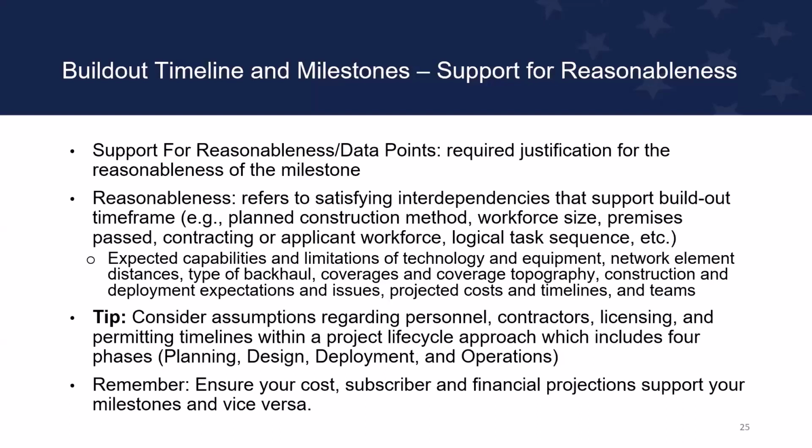And again, let's talk about limitations. Is it topography, construction, the weather even? So there could be many issues that are unique to your situation. So refer to those in considering how to define your milestones. And include your engineers in planning and make sure that you understand and they understand what your individual